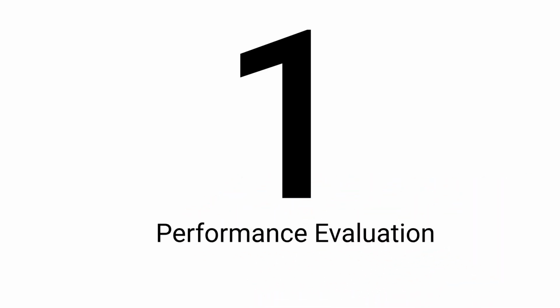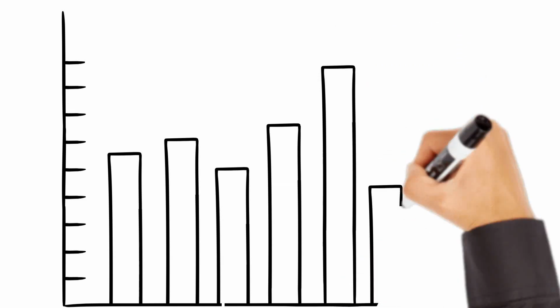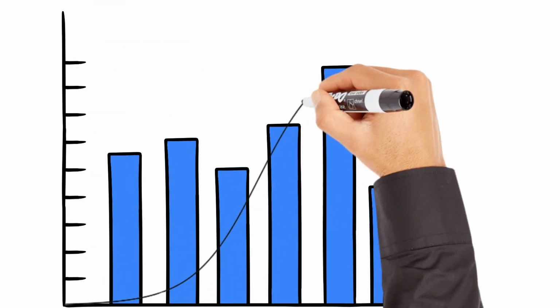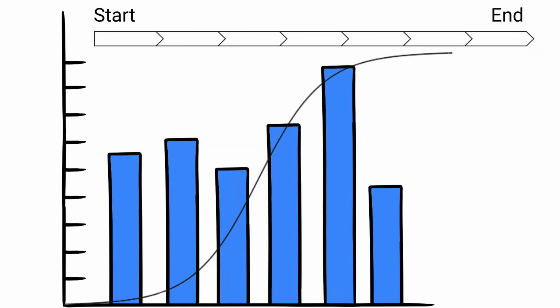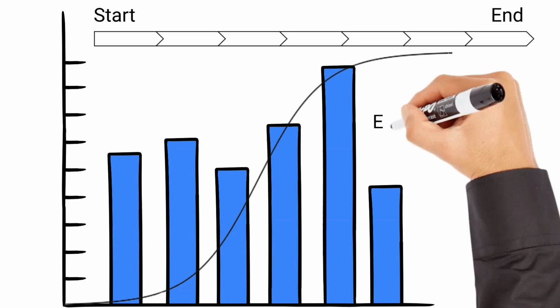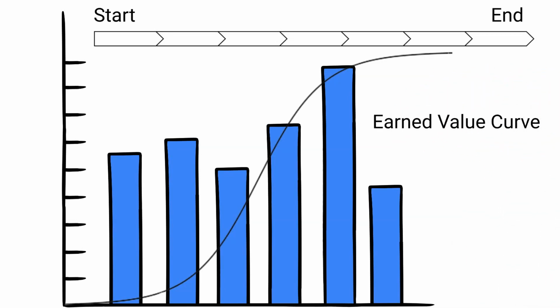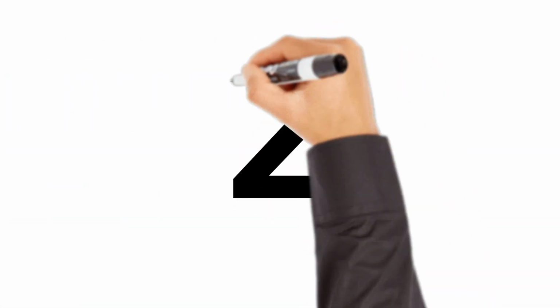The very first use of the S-curve is for progress and performance evaluation. S-curves play a key role in evaluating a project's progress and performance, especially with the use of earned value management. Comparing the planned S-curve, which is also known as performance measurement baseline, or sometimes as planned value, with the earned value curve reveals great information about the project's current status and future forecasts. This simple S-curve quickly reveals any divergence from the baseline plan and allows the progress of a project to be monitored effectively.